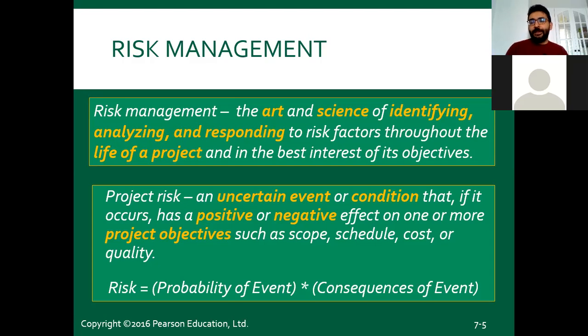What about schedule risks? There is time pressure, for example. You are making a project for the government, and the government asks for it in 1 year. If you cannot meet this timeline, you will face penalties. So it's a schedule risk, right? Uncertain. If you cannot finish the project in 1 year, you will face some penalties, and it's very problematic. What about cost risks? You calculate the cost plan for a project, but then there are unexpected costs that you didn't plan, that you didn't think of. So it's a risk. And the quality risk: the end product, specifically for technical product development projects. You create something, but it has low quality. So it's a huge risk.